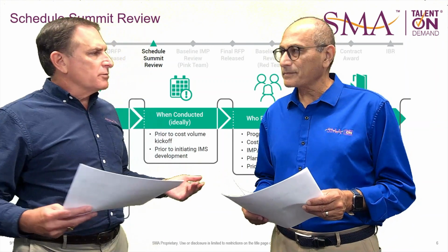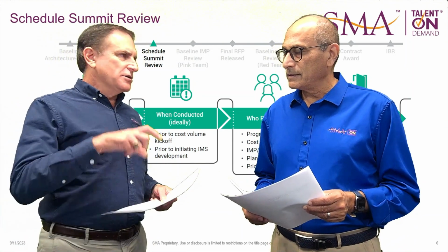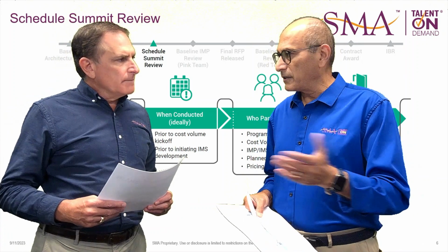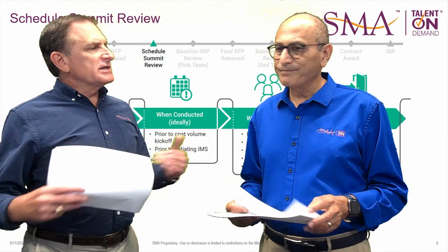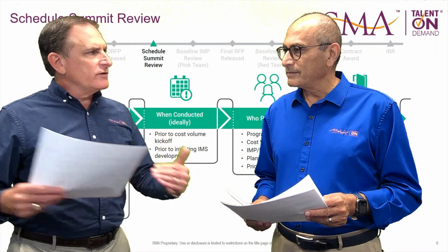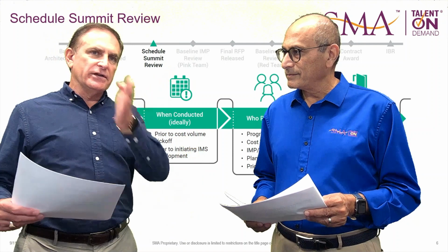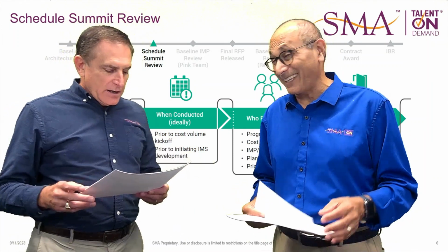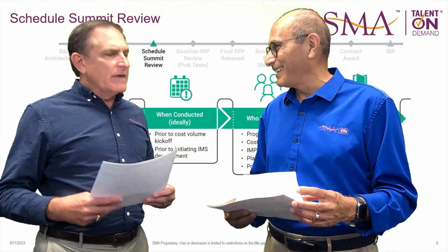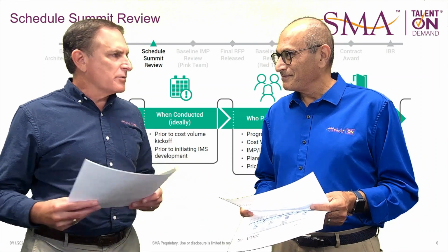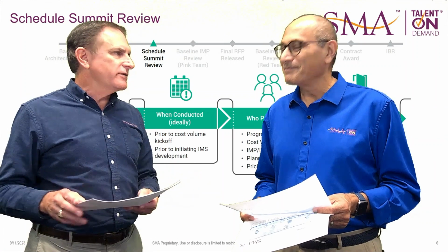Funding constraints are important, and this is where understanding your customer becomes an important criteria. How much a customer is going to fund by government fiscal year, for example, right? Because if you put together a cost volume that's aligned to that, and they look at it and say, wow, this funding is exactly the way we have money. And the schedule has to be aligned to it, obviously. Exactly right. Because you're not going to do work that's not funded. And this is where I think customer intimacy becomes a critical component to success, even on the proposal. And this is how we articulate that into the story.